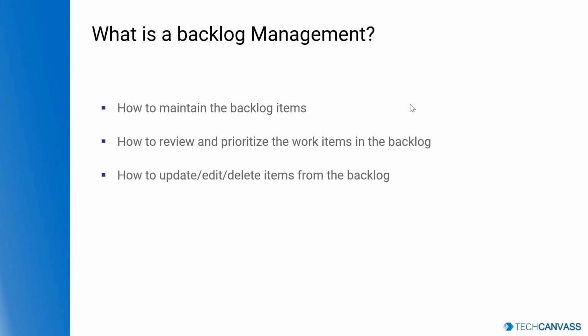So in waterfall based projects we don't use the term backlog management, but there we use something called requirements management. So we have something called a traceability matrix where we manage the requirements and keep them updated. Okay, has anyone seen a requirements traceability matrix?